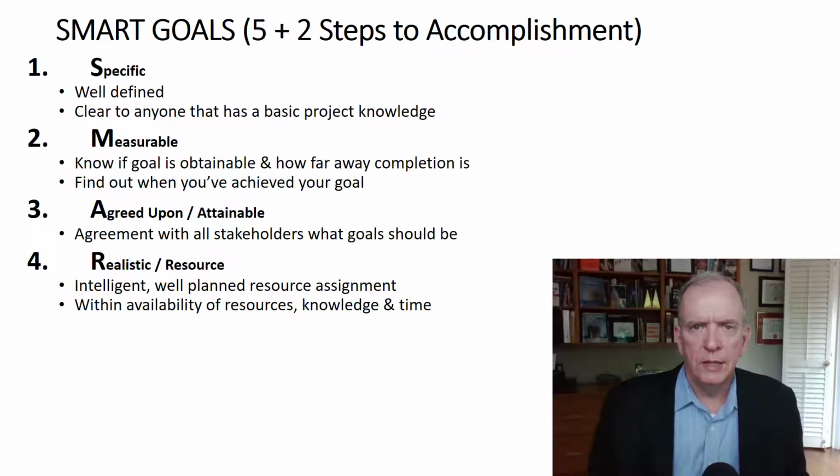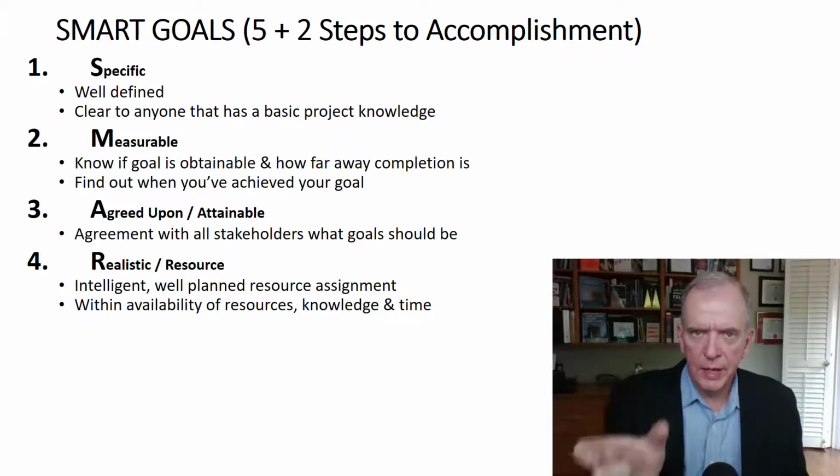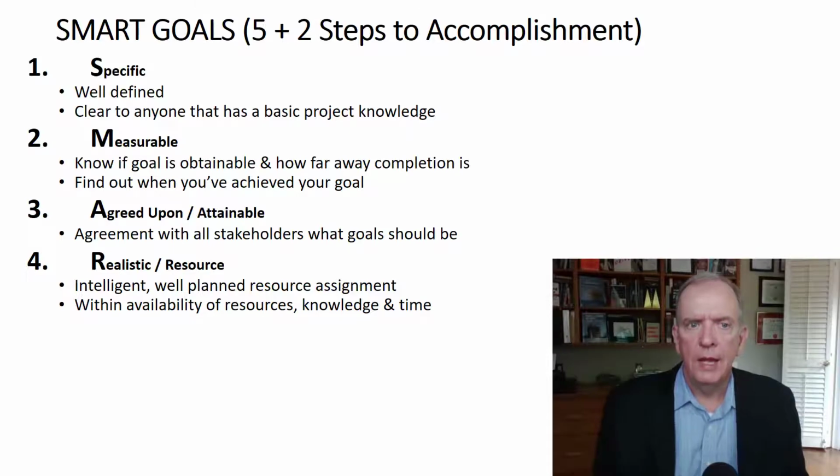I think of agreed upon as if you're on a larger project or in a business, you're trying to get things done, so you need other people to do these things. You're holding some accountabilities, and so you're making sure that the other person or the other company that you're working with is agreeing to your terms. So in a construction project, we need to have the electrical work roughed in this period of time. And this is the work that needs to be done in this period of time. And this is the quality expectation that we need in this period of time. And do you agree to it?